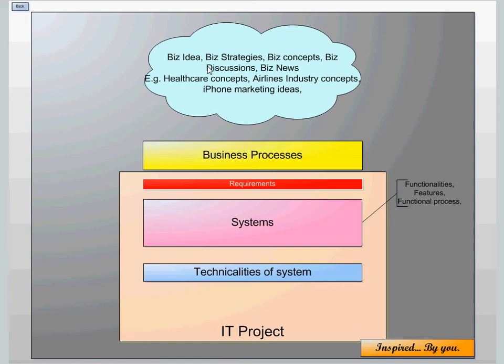The person who needs to do that hiring should be chosen in November 2013. Otherwise, he won't be able to do that. And he needs to understand the company's policies and what the company is trying to achieve. Remember, no IT yet. It's all non-IT projects. Then at that point of time, they realize that the distribution of the leads among cold callers can be a problem.